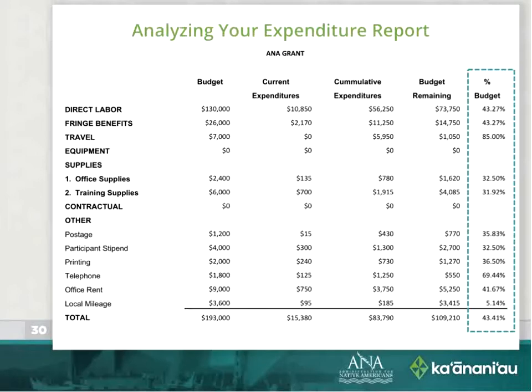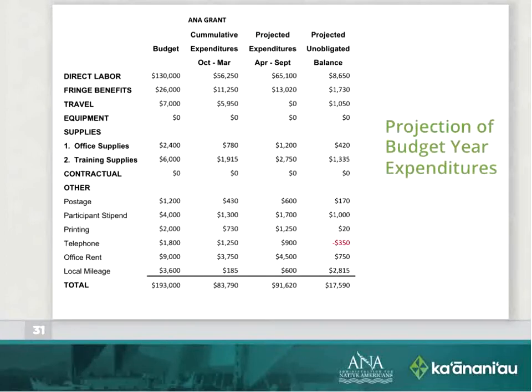Okay, and based on that, I think that I do have some money that I might be able to move between the two projects. I think I have about, well, looking at this, I have about 9%. But before I can say that definitively, I'm going to have to look at what am I going to incur in costs for the next 6 months. All right? Maybe there's some costs that are going to come into play in the next 6 months, so I can't just go straight on that report.